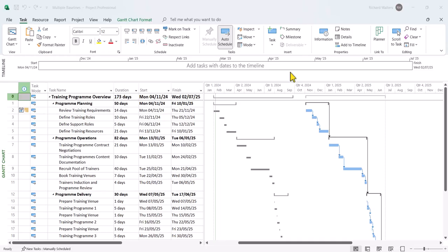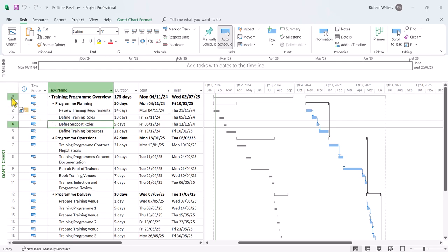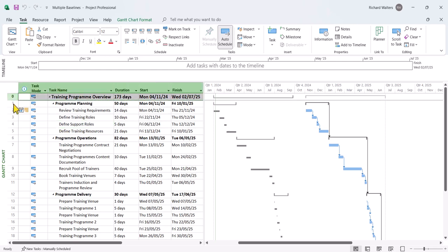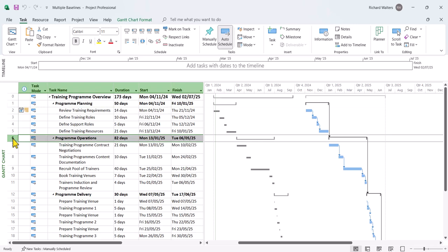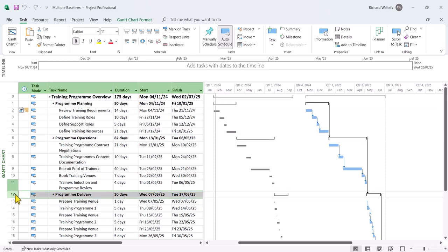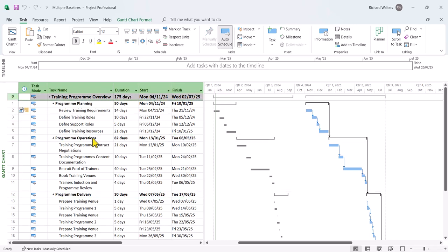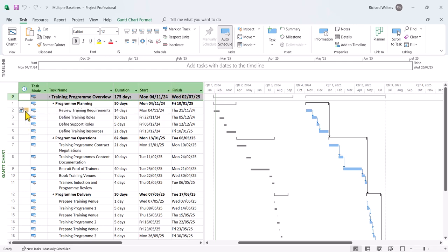In this training demonstration, we're going to look at multiple baselines within Microsoft Project and sometimes the need to set more than one baseline. So in this particular example I've got on screen, we've got a situation whereby we're trying to manage a training program with different sections like a planning section, operations section and delivery section. And there's a situation here where there's a note against a constraint where multiple members of staff and contractors are unavailable. So we've got to delay this project by many, many months because of unavailability of members of staff and resources. And we're at the present out to November, the 4th of November.